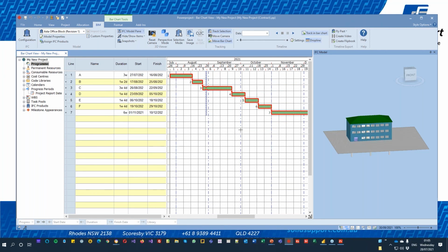People can update it with progress, with comments, notes, pictures, annotated pictures, submit that back, and you import that back into Powerproject, and that progress data is then stored and kept when you go into your site, back to your Vision. So Vision sits across everything.